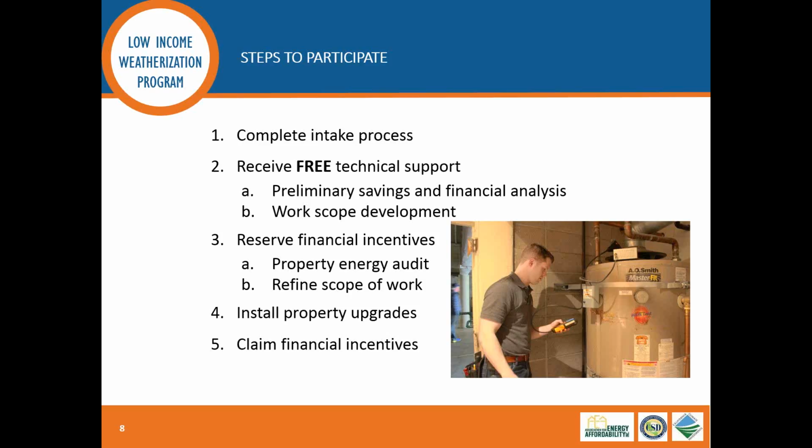We'll be asking for any documentation they have currently, like property needs assessments or historic energy audits, or really anything to help us do a desktop analysis to see what the potential is. And what we'll do is just remotely identify the general opportunities at the building and roughly what the percent savings would be, to see if they meet that 15% savings threshold, or the 25% savings threshold if they want to leverage other major sources of funding.